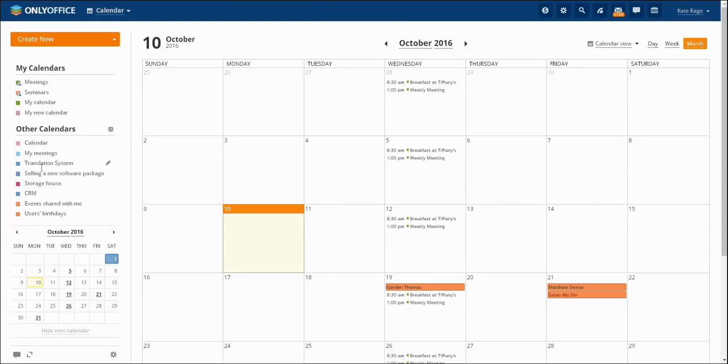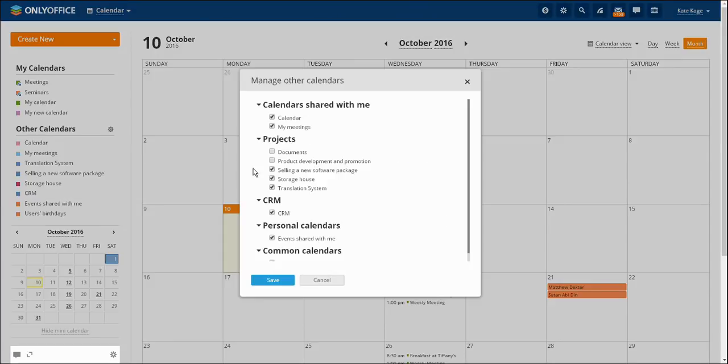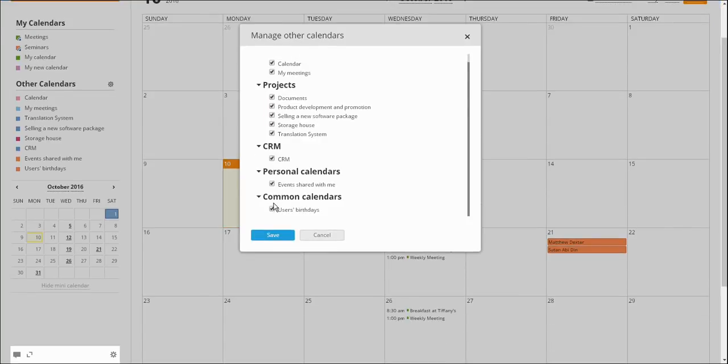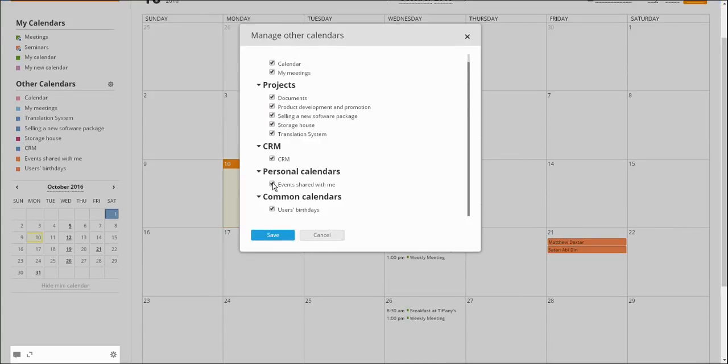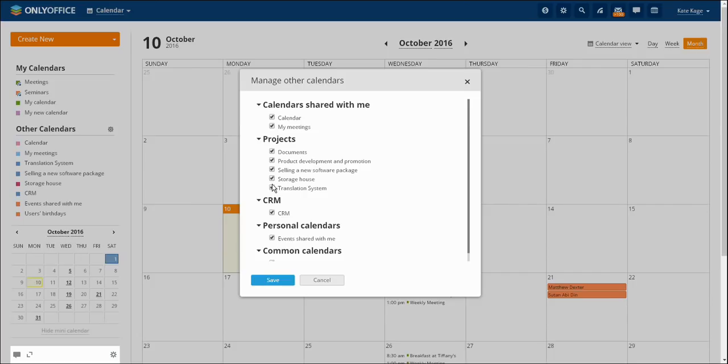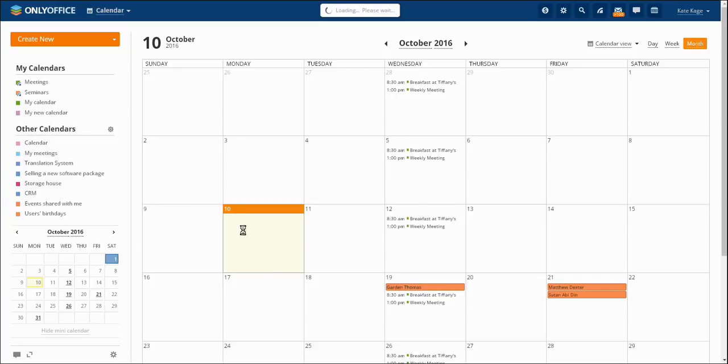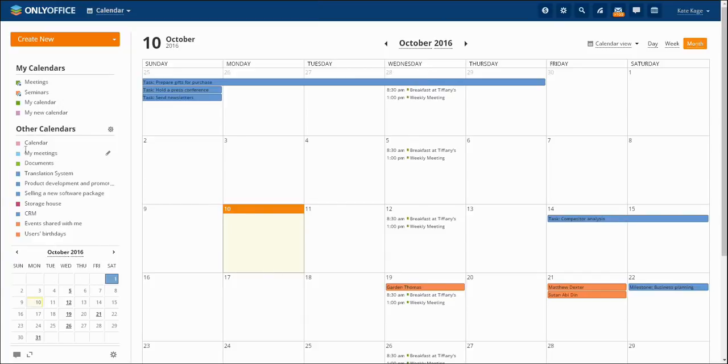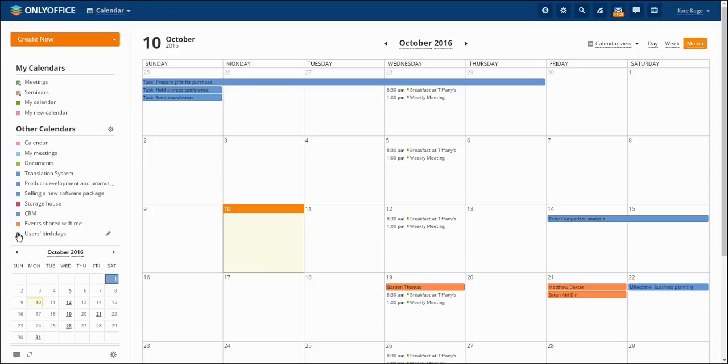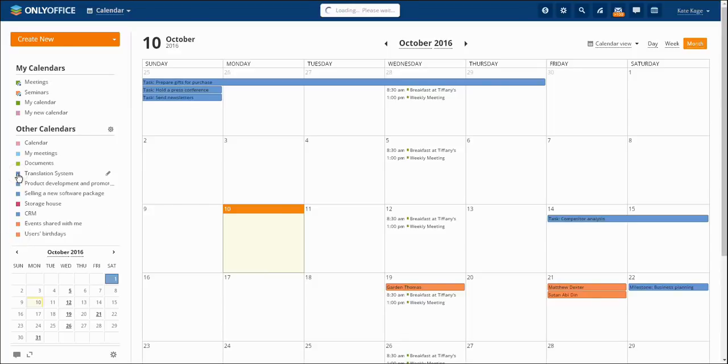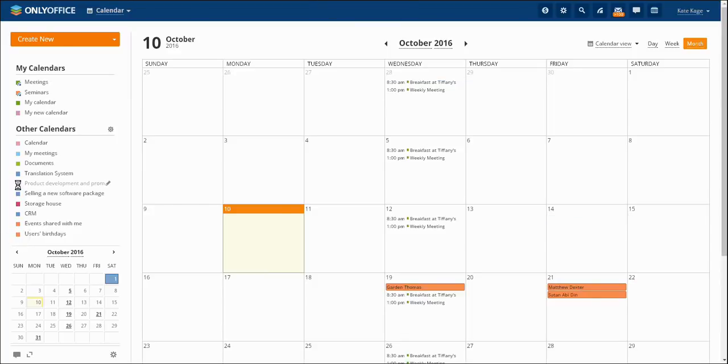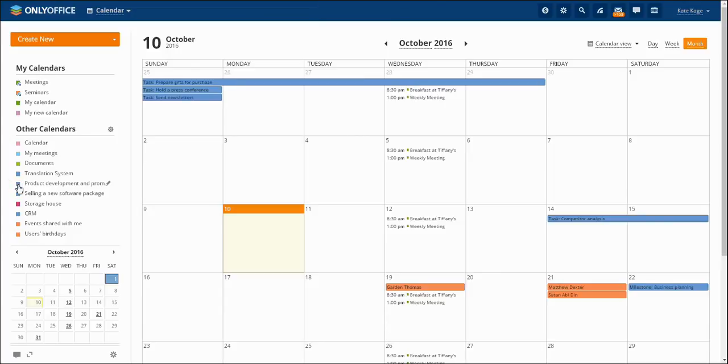In Other Calendars section you will find a list of calendars you have access to. If you don't need all the calendars to be displayed just press the function key to the right of Other Calendars and choose the ones you want to see. In Calendars of the projects there is a list of projects you participate in. The milestones and tasks are automatically displayed here. It helps you to control deadlines.